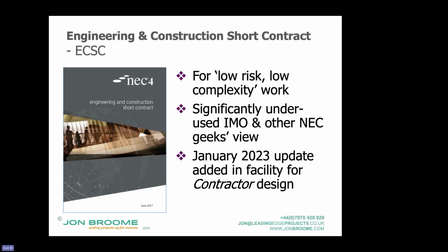I suppose my guidance would be, as I did with the Royal Parks, you say, what are the specific things which add in the complexity? And if it's one of the things which the full contract handles, so we wanted greater programming input, okay, we can grab clauses and put them in.